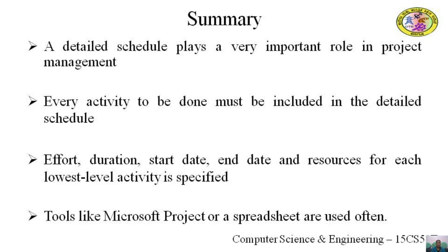Detailed schedule includes each and every activity to be performed. The project manager specifies the effort, duration, start date, end date, and resources for each of the lowest level activities in the detailed schedule. Tools like Microsoft Project or a spreadsheet can be used for detailed scheduling.